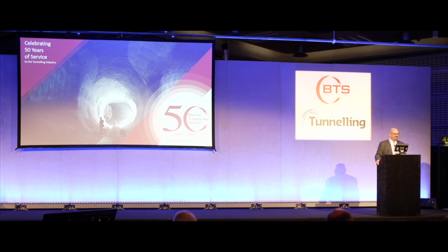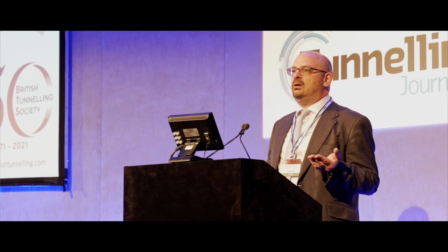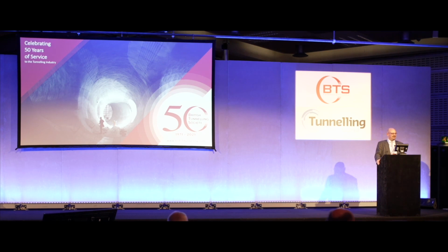John Clark Hughes, Lower Thames Crossing for National Highways, and with Jacobs. Hopefully an easier question for you. I noticed in your extract there reference to the engineer in some of the clauses. I assume that the BTS specification is suitable for use with the NEC form of contract with some front-end drafting to make it compatible. The role of the engineer is defined in the introduction to the specification. It's fundamentally the person who can take engineering decisions. This is quite differently defined from contract to contract, and the BTS specification explicitly excludes this sort of detailed definition. It's not a contractual document. The engineer is the guy who calls the shots, and I think that is as far as the definition in the BTS spec wants to go. There you are, I told you it was easy. Thank you. My pleasure.